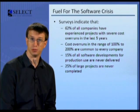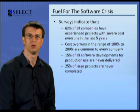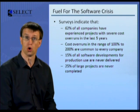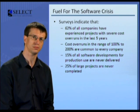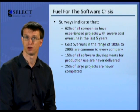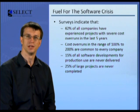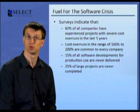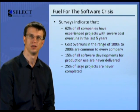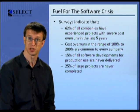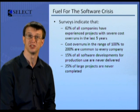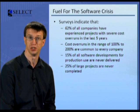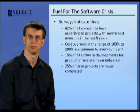It seems unfashionable to still talk of the software crisis when there appears so much effort and money being spent on software development. Yet the evidence is all around us. One of the most common symptoms of the software crisis is the runaway. Surveys indicate that 62% of all companies have experienced projects with severe cost overruns in the last five years, and that cost overruns in the range of 100% to 200% are common to every company. 15% of all software developments for production use — excluding research and development — are never delivered.